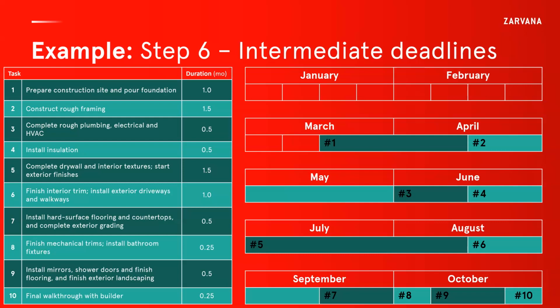What we know here, which is great for this project, is that you actually don't need to start this project until the middle of March, and so you have some time to prepare for it. So that might be super important in terms of when you're assembling the team, when you're compiling the resources, buying the products, etc. And so you can see the value of this type of exercise.